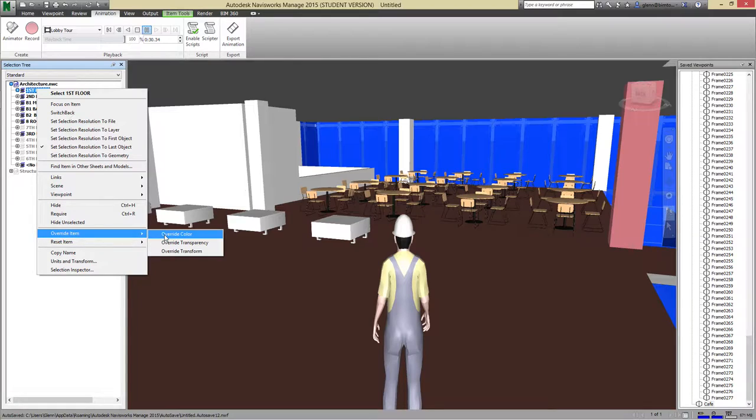That's how they're basically going through and setting up these color overrides based on different search criteria. So great. We're going to search for everything by vendor A and colorize those red. We can go through and find everything that's going to be built in the next 2 weeks and color code those red, or whatever it is, and help people sort it out. Or just hide everything that's not going to be built in the next 2 weeks.